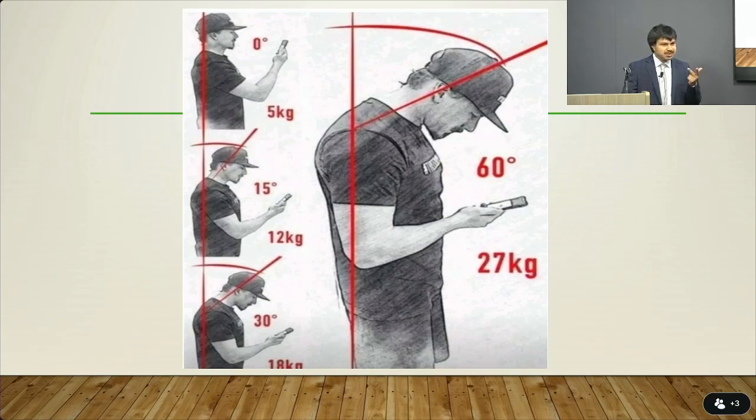So one major difference you may already know is the difference between SHOP and STIP. SHOP is the State Highway Operations Protections Program. It means what it states. So you're not going to add any new lanes. You're going to protect what is already there. So that means most of the rehab projects, anything that doesn't add more cars to the existing roadways, falls into the SHOP funding category. So most of the projects across the state these days would fall into the SHOP category.